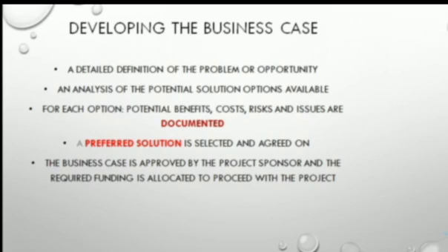Now you can say, okay, maybe you come from a riverine community where there are lots of fishes, and fishes are very cheap. You can decide to go to your community and be bringing fishes to this community to sell. Or you can decide to build a pond in the community, then you breed fishes for sale. Now, you have to assess these two options. Which of them will benefit you the most? Understand? Then also you assess the cost. What is the cost of setting up a fish pond and breeding fishes, and the cost of having to transport fishes from your community to this community to sell? You assess the two costs and you go for the one that is favorable to you.